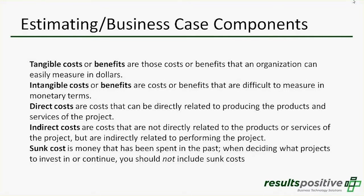Unless you really can tie an initiative to the project, so maybe you brought in a consulting firm to do a bunch of market-based pre-work and so forth that really drove a decision around this is why we're going to do project X. In those instances, it may make sense to tie those sunk costs in from a business case perspective. For the most part, typically if organizations are bringing in assistance, or if they're going to go do studies on some capability that they want to drive, that's typically accounted for in other places within your budget.